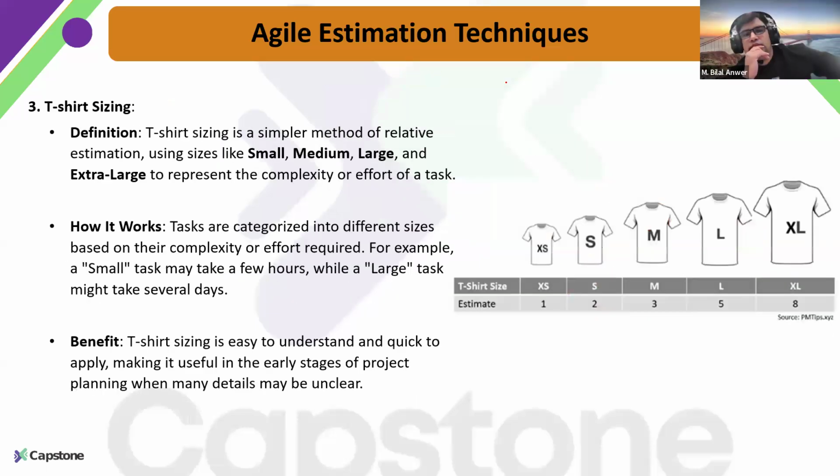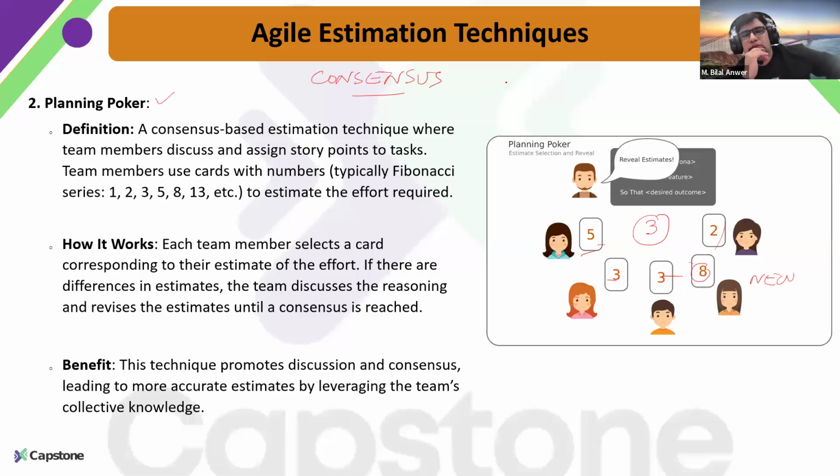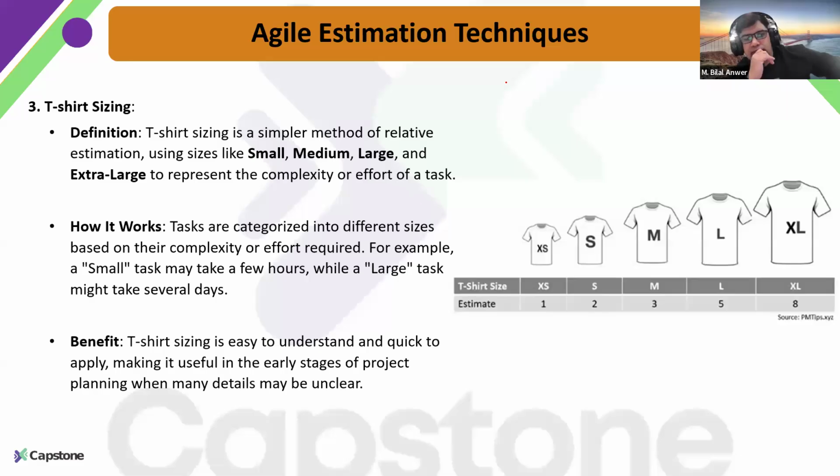So who manages this exercise? The Scrum Master or the team? Scrum Master, in any ceremony, the Scrum Master. Okay, right. And we can utilize the t-shirt sizing technique we already discussed. You can assign t-shirt sizing as well, which can correspond to the Fibonacci sequence, and then you can start developing it accordingly. Again, there has to be consensus around it.